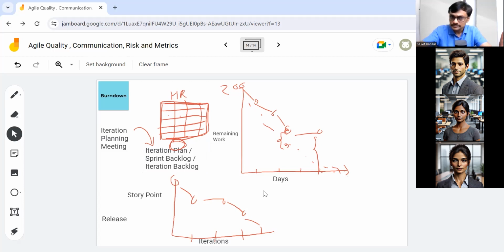That's the idea. So can we use this in a program as well? Any level. Program level, yes. In total work, you need to identify the x-axis and y-axis at a day level. And in multiple teams, you may aggregate for multiple teams. So there is a possibility you may use a release level burn down chart. If you are using it at a multi-team level, then you probably won't be doing hour based. You will be doing story point based, most likely. And you might be doing it at an iteration level rather than on a daily basis. I use it more at the program level. Perfect.